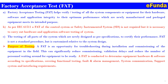Purpose of testing: A FAT is an opportunity for troubleshooting during installation and commissioning of equipment in the field area. This can significantly reduce commissioning and validation delays, and reduce the number of personnel waiting for equipment to be ready. A FAT is conducted to determine equipment hardware and software according to specifications, covering functional testing, fault and alarm management, system communication, support system and interfacing requirements.